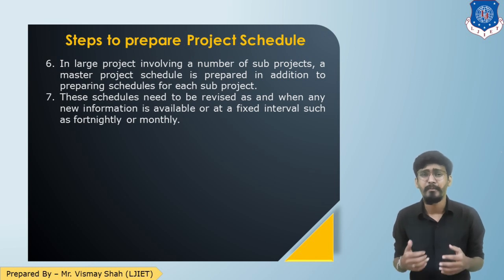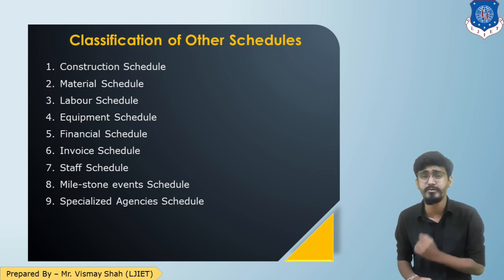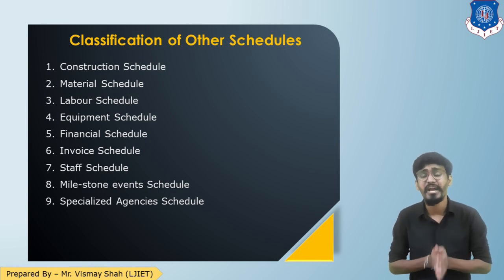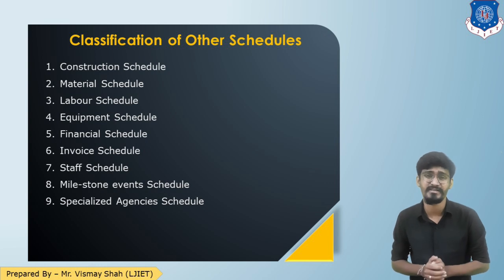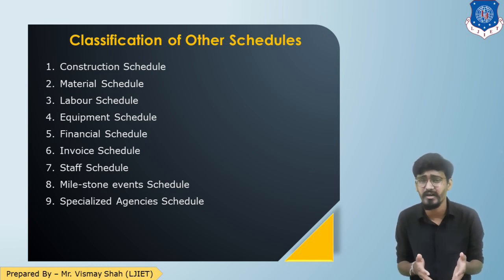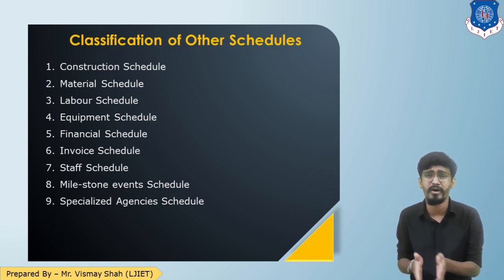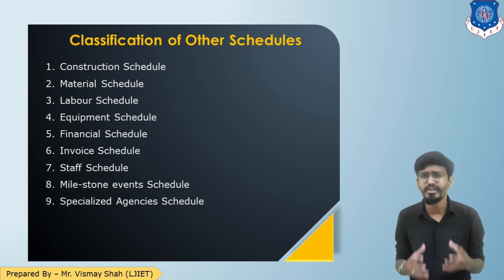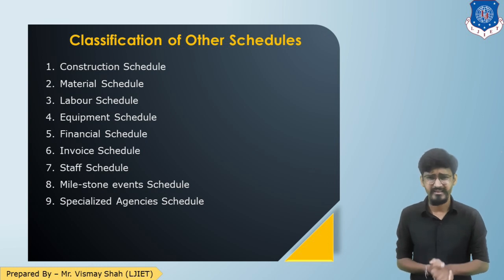There are a number of types of schedules used in a project. The classification includes: construction schedule, material schedule, equipment schedule, labor schedule, finance schedule, invoice schedule, staff schedule, milestone event schedule, and specialized agency schedule — nine schedules in total used in the construction industry. The purpose of each is: the construction schedule provides the roadmap for the entire project; the material schedule tracks material quantity at each stage; and similarly for labor, finance, and the other resources or agencies.